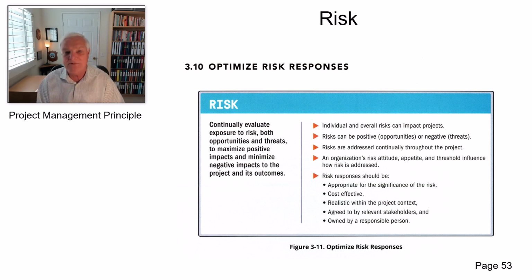You want to optimize your risk responses, both to positive risks and negative risks. Positive risks have a shorter lifespan. They can become available to you and your team possibly just today, for the next hour. If you make this move, you can move forward in a positive direction, achieving something that you couldn't if you wait till tomorrow. Those are the kind of things, positive opportunities that need to be addressed, and there's a series of approaches to that. And negative threats.